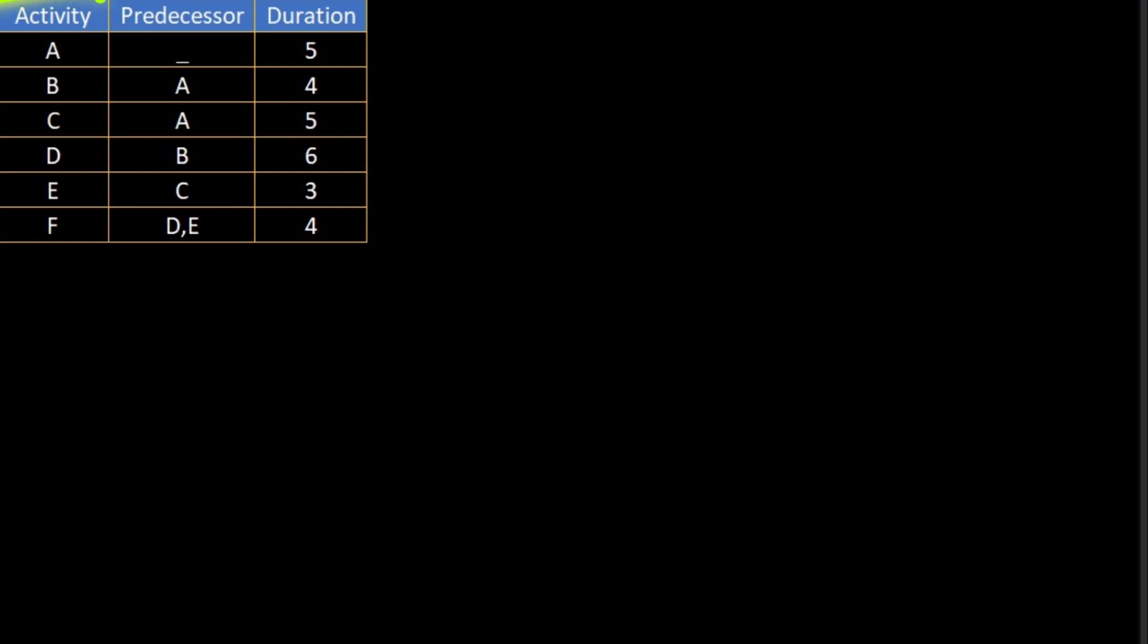It has three columns. First is the number of activities present in the project for completion. Then there is a predecessor box, and these activities can only be started once the predecessor activity is completed. Like B can only be started if A is completed totally. C can only start if and only if A has completed. Similarly, F can only start if D and E both are completed. If there is no predecessor, an activity can start independently without any preceding activity.